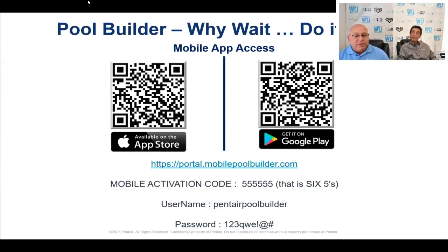So let's just say I'm the superintendent, we're out walking around, and you're the customer, and as we're inspecting your job, you say, Tommy, I really want some more deck here. I could create a change order, send it to you, and then you can electronically sign that change order for me. So then we're able to move it to the next process. And I noticed one of your vendors in there was Lion Financial. Are they connecting to this for those draws when you're using them for a pool loan?